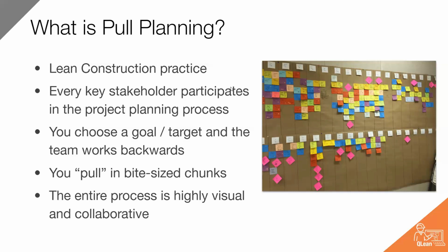We feel pretty strongly about this when you pull in bite-sized chunks. I know there's different philosophies, different levels of pull planning that people do from very big swatches, but we believe in the 4 to 6 week sprints. But it's really pretty optional. We've found it's hard for everybody to collaborate and get their head around a very long timeline. So to do this in pieces of the project has really served best.